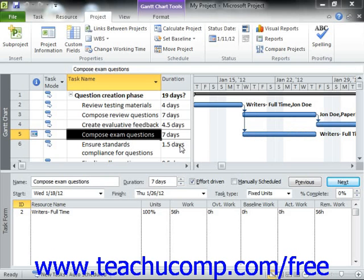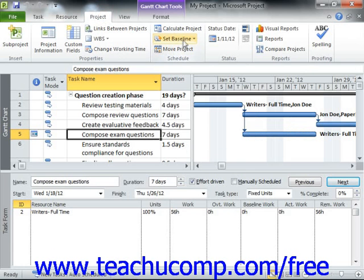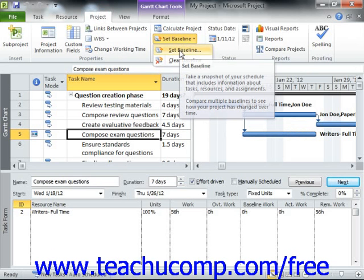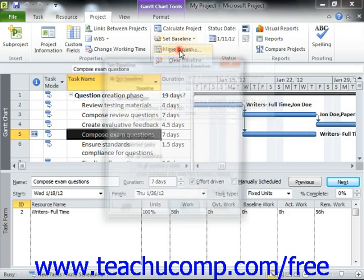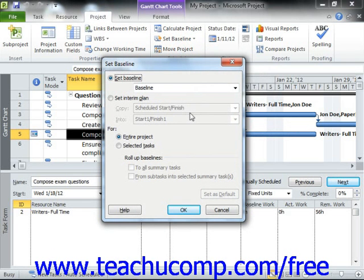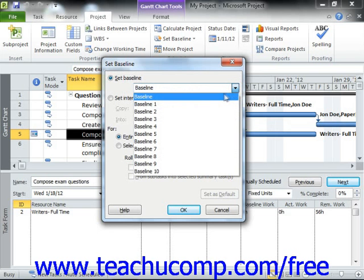To save a baseline copy of your project file, click the Project tab in the ribbon, and then click the Set Baseline dropdown button in the Schedule button group. In the dropdown menu that appears, select the Set Baseline command. In the Set Baseline dialog box that appears, select the Set Baseline option button, and then select the name of the baseline copy that you want to create from the adjacent dropdown. You can have up to 11 different baseline copies of your project file.